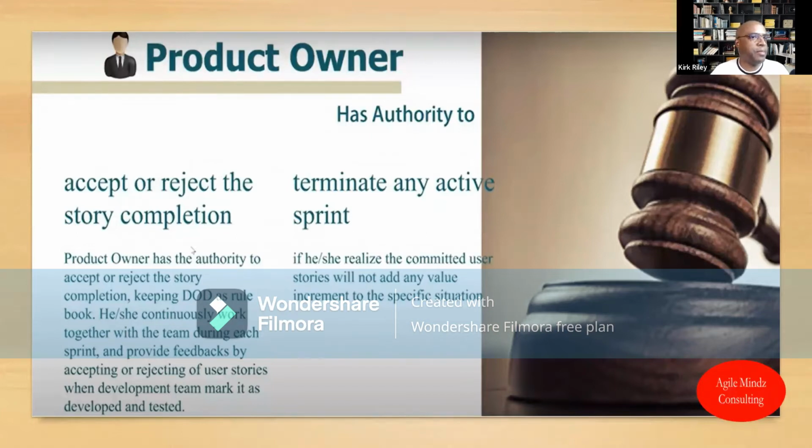So there may be a time where you have a user story, and based on what the end user and the stakeholder are looking for, you're the one that makes the decision to remove or reject that particular user story. The only time I know that I've rejected a user story is when the priority of the stakeholder has changed, and they realize, okay, we don't necessarily need that user story. So that's when we go ahead and remove it.